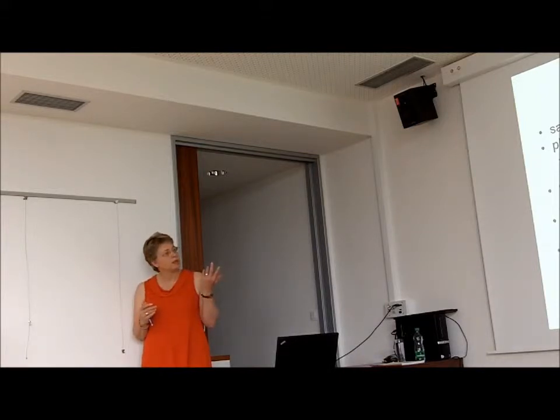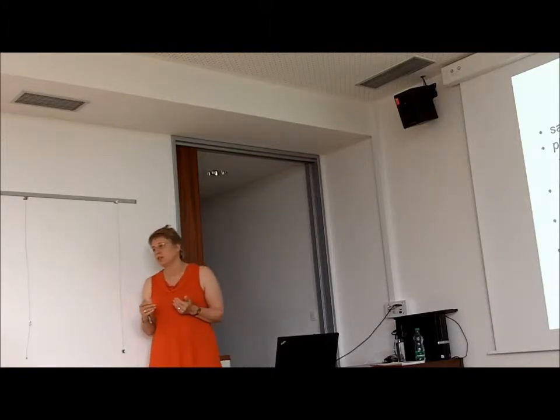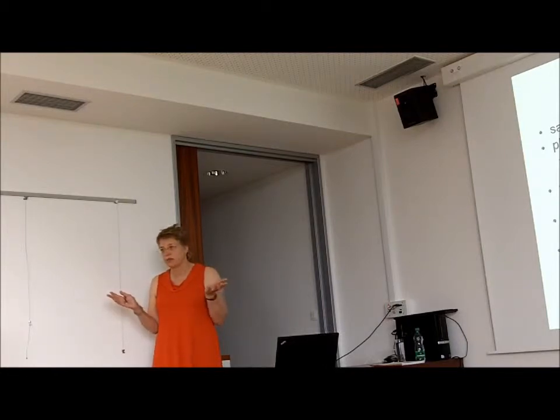In terms of the timing of the assessments, I think the key lesson for us has been to start the HRA early alongside the SEA. Use the HRA as part of the plan development process rather than a post hoc checking process where you might need to go back and change the plan. These are old lessons that we had from the EIA days.